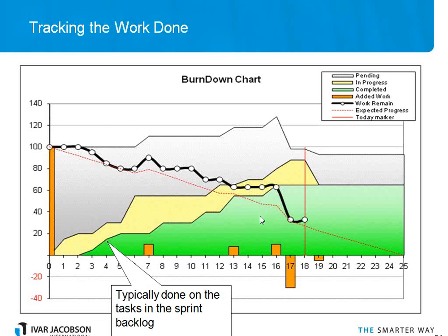Okay, so how do you do the descoping? Well, they were in scope at the beginning of iteration 5, out of scope by the end of iteration 6. We don't have the granularity to say exactly which day the decision was made, but by the end of the iteration, they were no longer in scope, so we didn't need to worry about them in iteration 7. We would have needed more iterations if we wanted to do that extra work. Okay, so I hope that answers that question.